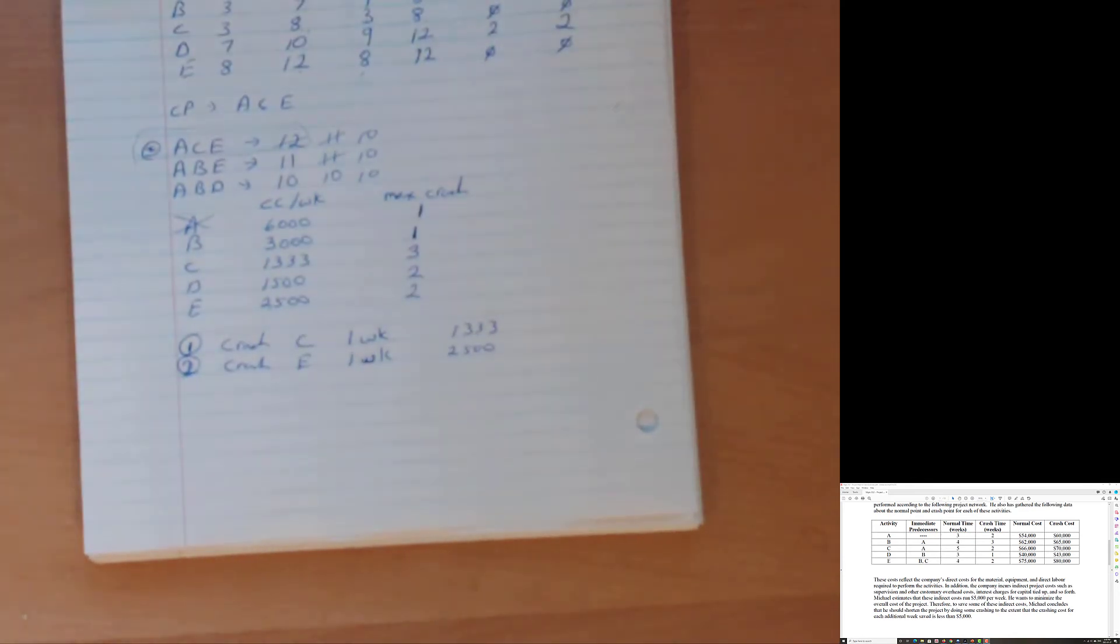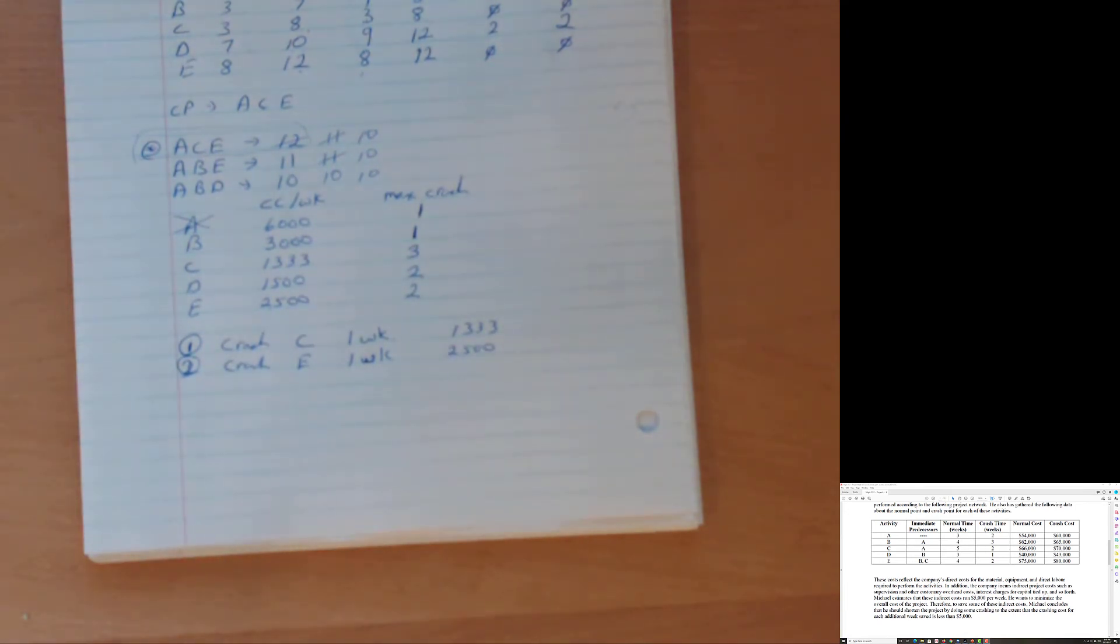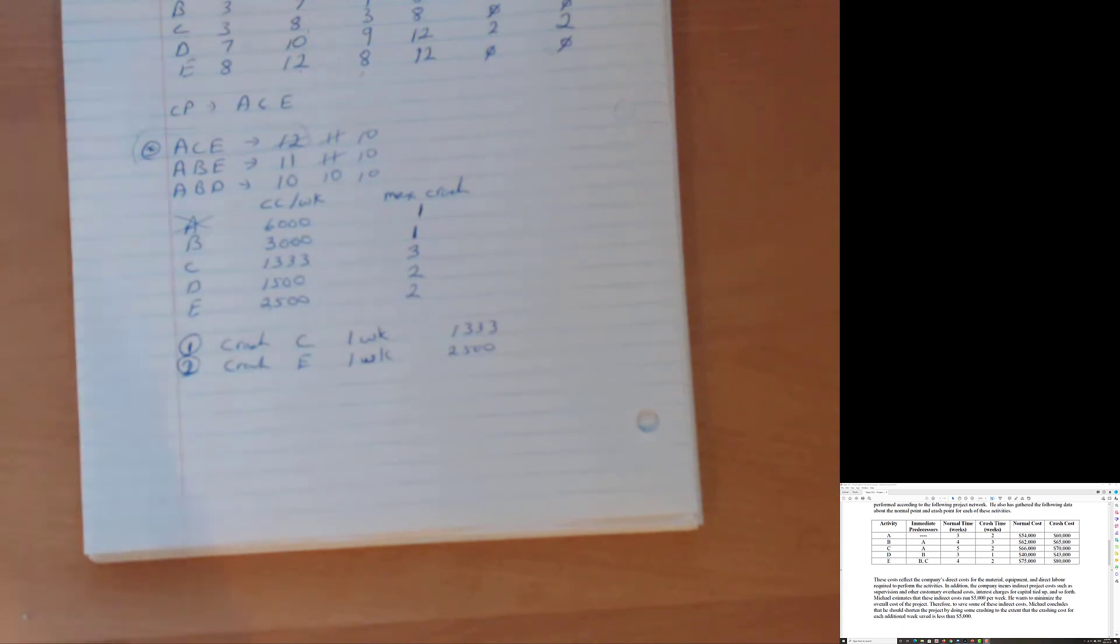Holy cow. Just when you thought it was getting boring. All three are critical paths. Whoop, whoop, whoop. You don't have one. You don't have two. You have three. You have three critical paths. And so now you got to crash them all at the same time.